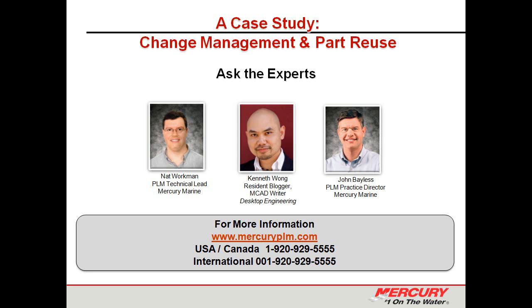Okay. And here's a question. Are change board meetings regularly scheduled or ad hoc? I think we may have touched on this, but let's go and answer it. They're regularly scheduled in the new product programs, and that's because in the detailed design phase, there's a lot of changes that you can count on. Every week there's going to be something that the change board needs to go through.